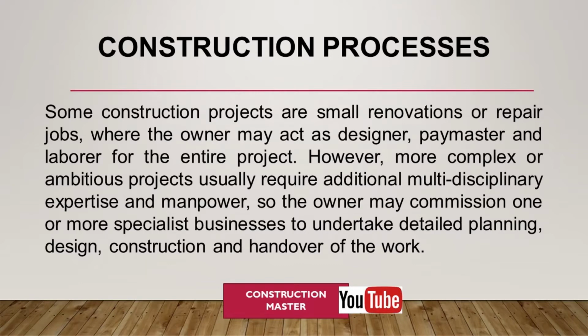Often the owner will appoint one business to oversee the project. This may be a designer, a contractor, a construction manager, or other advisors. Such specialists are normally appointed for their expertise in project delivery and will help the owner define the project brief, agree on a budget and schedule, liaise with relevant public authorities, and procure the services of other specialists,